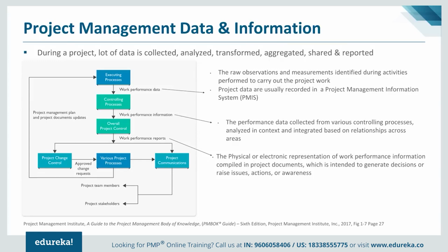These reports are then shared with the team members as well as the stakeholders through the project communication management. Now, whenever there is any project change that is introduced, it goes through the project change control. Whatever the change that is incorporated at any point in time in the project, it is either approved or rejected. If the change is approved, it will go back to the executing process and the same thing will happen. And all this information is again shared with the team members and the stakeholders.